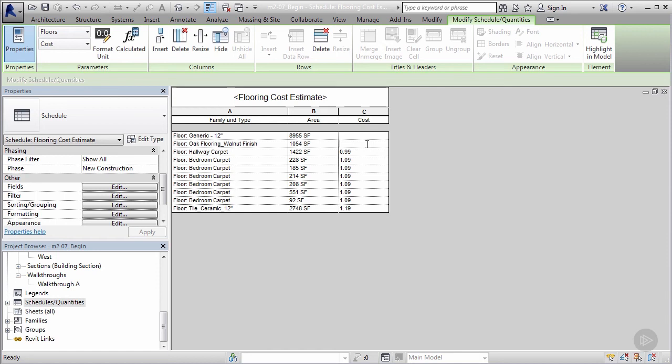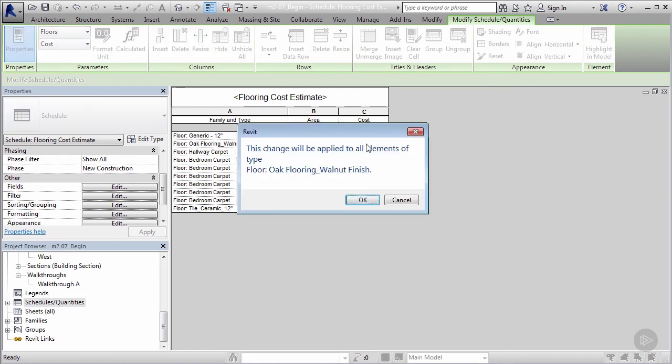But when I do that, the square footage remains the same because it's the same geometry, but the cost parameter is changed. So now I can put in a different cost associated with that. I can say that floor may have been a little bit more expensive—maybe that flooring cost me $2.09 per square foot.